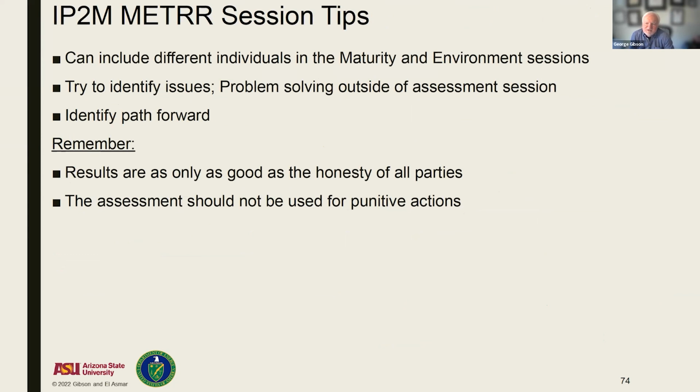In terms of some session tips, we've used this tool some in the past. The things that we've seen is, you may have different individuals in the different sessions. When you're doing maturity, you have certain people that have a knowledge of the technical aspects of the EVMS system. In the environment session, it might be more on the management side with some of the technical folks. It doesn't have to be the same group doing both the assessments. Certainly, our recommendation is to have a neutral facilitator help in that.